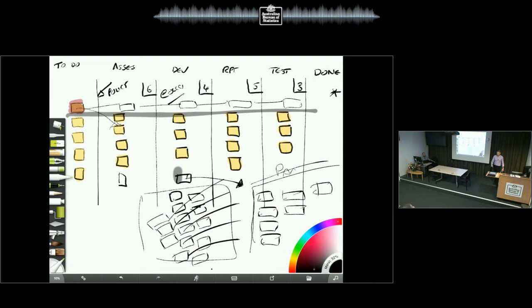So the best thing to do is stop the team and allow the stakeholder to know that we can't do anything else until you clear this backlog for us. And that takes some courage, and culturally, the whole organization needs to understand why you're doing this and why it impacts the team. Because having too much work in the system is very, very costly.